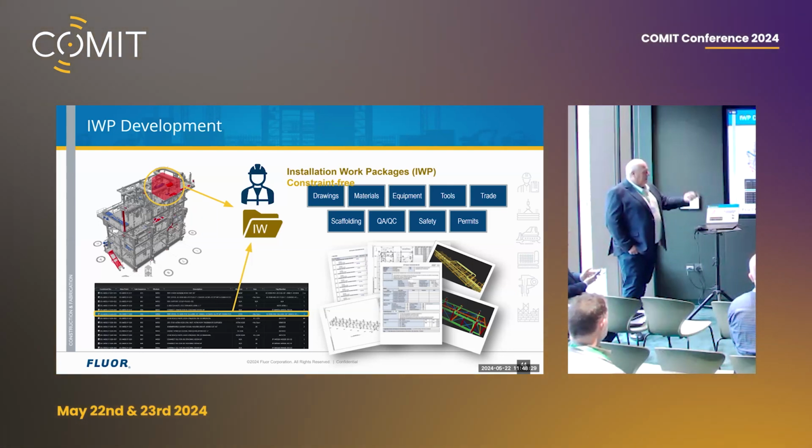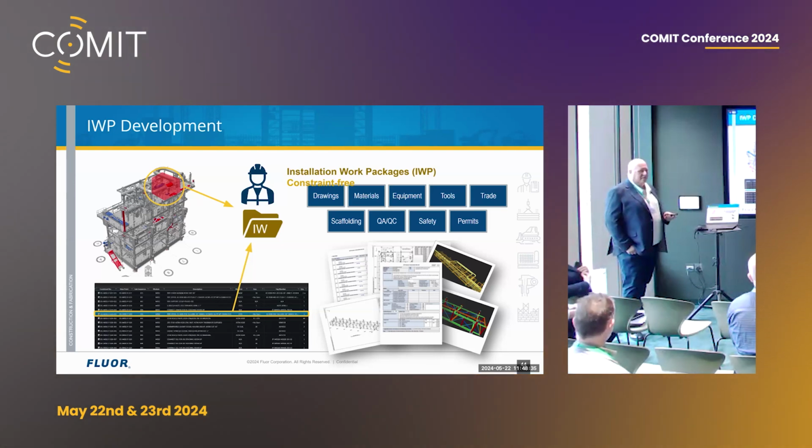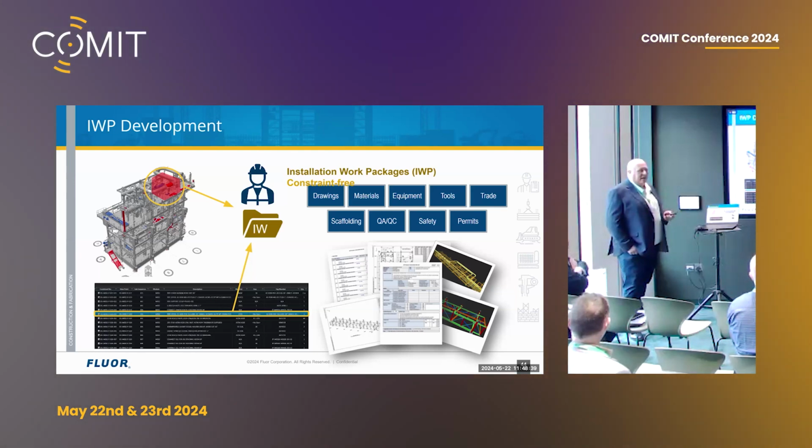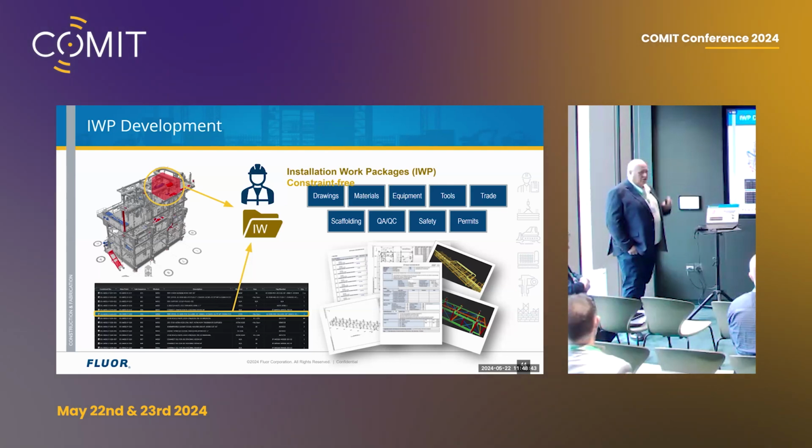Whilst your planner is looking at materials, if a material isn't there, don't just say it's not there, raise it as a concern. You might be able to change how it's being shipped. Worst case is you're going to get it air freighted somewhere or expedite delivery. Small extra cost, but don't slow the project down.